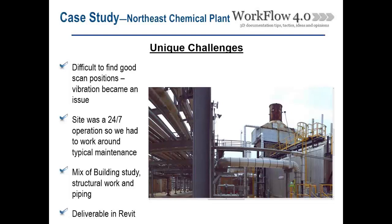When scanning areas like this, it's not always cut and dry where you can place a scanner or get good line of sight. They thought they could scan on top of platforms and equipment, but quickly found that vibration could be an issue — about 50% of the time the scans worked. Scans still had to be checked for accuracy, and the scanner instrumentation helps compensate, but doesn't always work. You can count on throwing away some scans or checking them each half day to make sure you got what you needed.